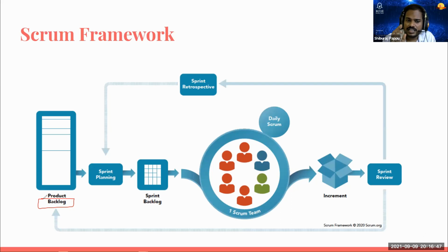After that, every 4 weeks, okay, a sprint is nothing but a duration, basically. It's a duration of 1 to 4 weeks. Okay, so a sprint is like one cycle. In the beginning, I have shown you one agile cycle. So that cycle is called a sprint. One sprint can be of 1 week or 2, 3, or 4 weeks. It depends on how complex your project is, and how much time it is going to take. Usually it is 1 week.